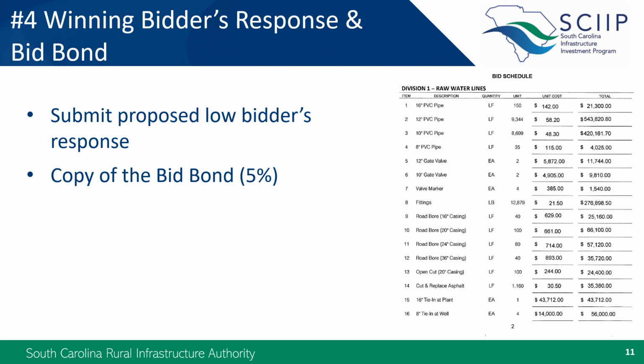Also, local funds may be required to cover allowances that are listed or identified on the bid form. Additionally, we have seen some use language such as extra work if ordered by engineer. This should not be used in determination of the lowest responsive and responsible bidder. Essentially, we view this as a contingency, and therefore the extra work must be properly implemented via change order and paid for using local funds.